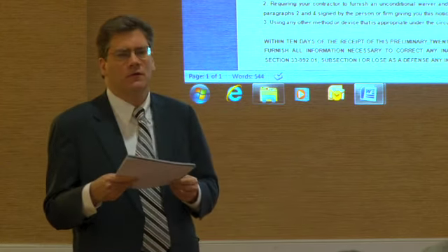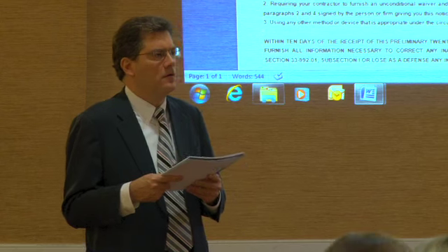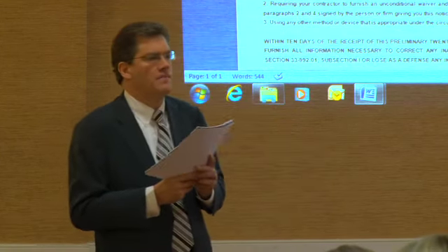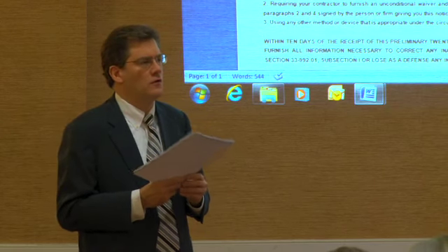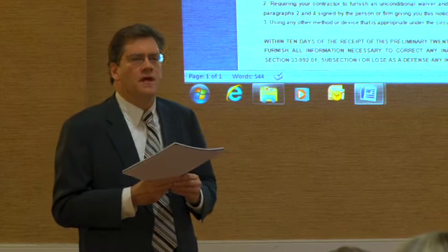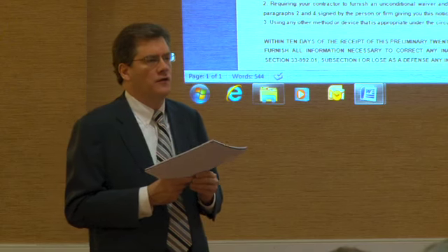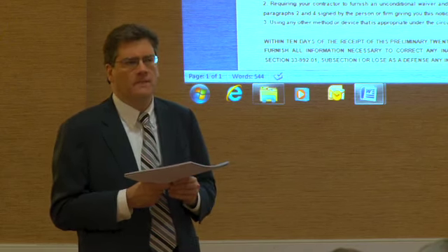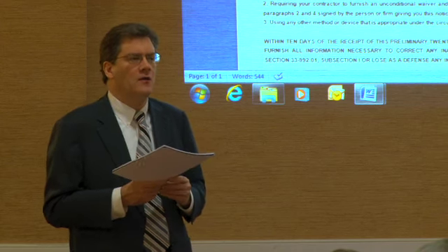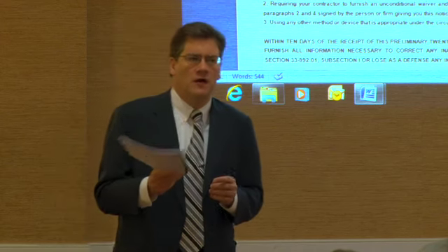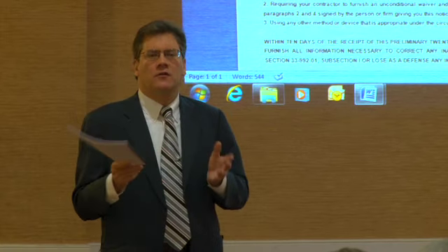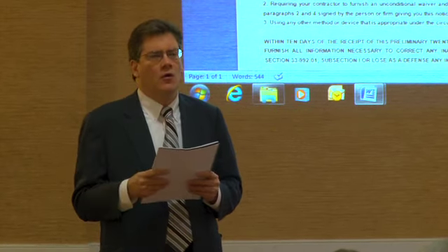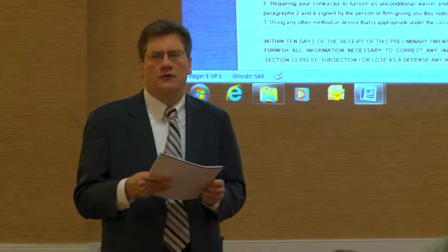Questions on prelims? You have to have a dollar amount in there, because Arizona requires a dollar amount. Arizona does require a dollar amount. Now, certain other states don't require a dollar amount. Here's what we do. We generally increase the dollar value of the preliminary notice by 25% or so. Now, it depends on whether we're dealing with a subcontractor, or a material supplier who sometimes will have a subcontractor element to what they're doing, or whether it's just a material supply contract.